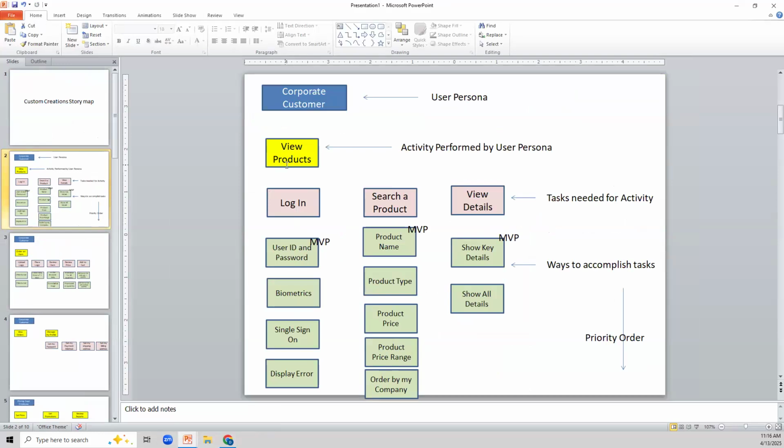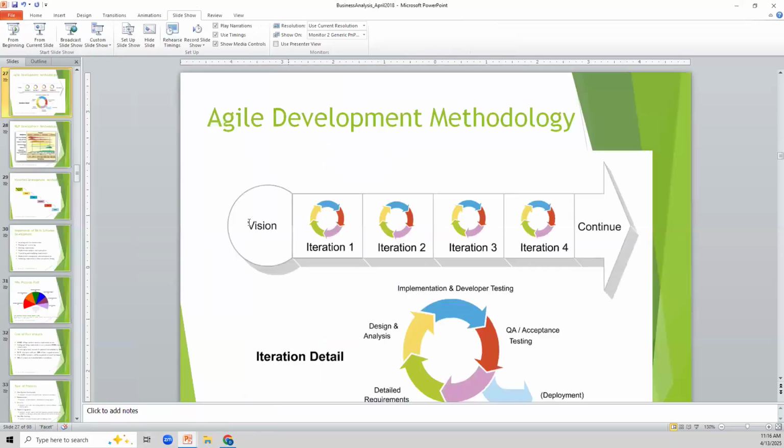And we typically want to do 2 to 4 weeks of iteration. Let's say I want to do 2 weeks of iteration. They will say, in 2 weeks, what you can break it down. Let's just slice it out. They say, I can do this, this, then this story. That becomes your iteration 1. Then iteration 2. Is it like a phase? Not exactly a phase. Think about it: what is the minimum product that I can deploy that the user can react to and provide me feedback, or can start using?